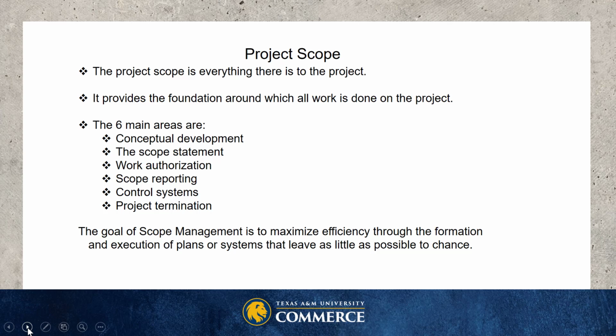And so you've planned around that, you've planned how long it's going to take, you've set up your work breakdown structure, and you're in the middle of constructing these two items for the customer. And here we come with a change. Suddenly we're almost finished and they want reports. Well, that was outside the scope, and that's going to impact the rest of the project.